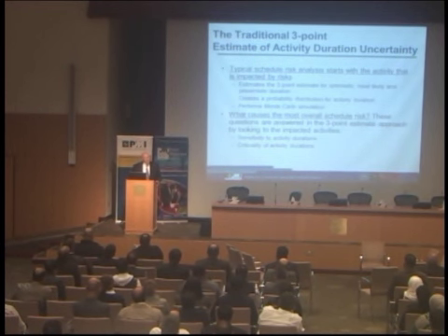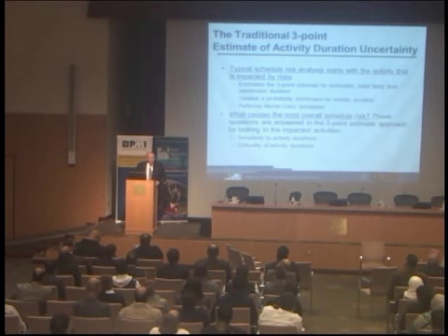In the United States, where the lump sum contracts are basically vague suggestions as to how much it's going to cost, the owner will probably pay. And in some other countries where you're talking about a national company, such as a national oil company, the national oil company is not going to sit there and force its domestic suppliers into bankruptcy. So the local national oil company is going to pay.